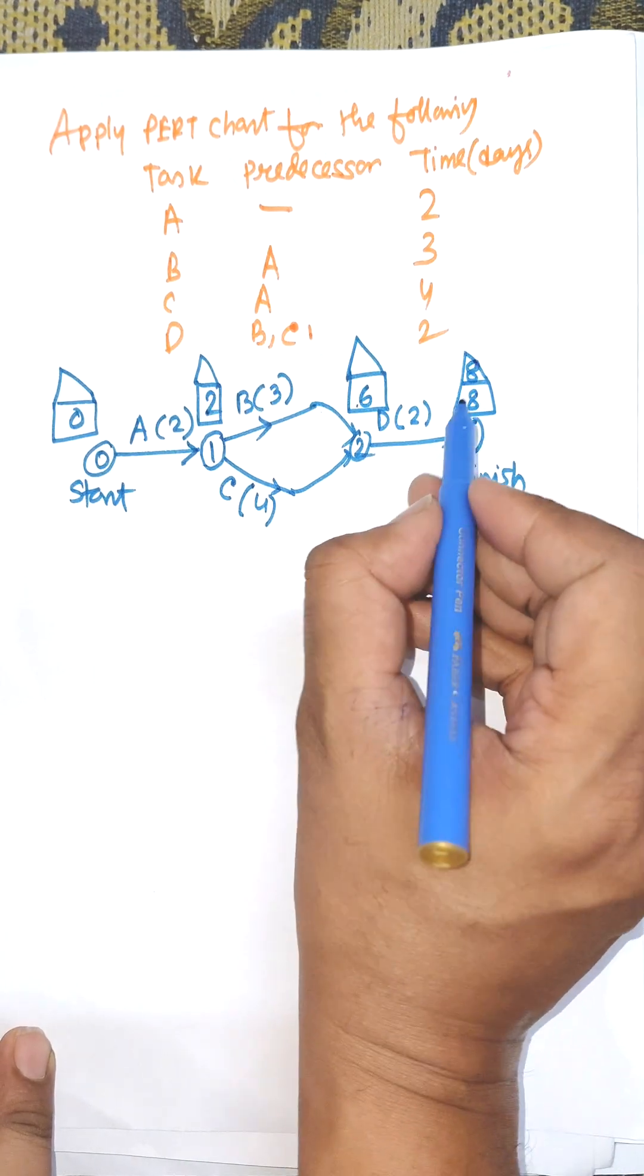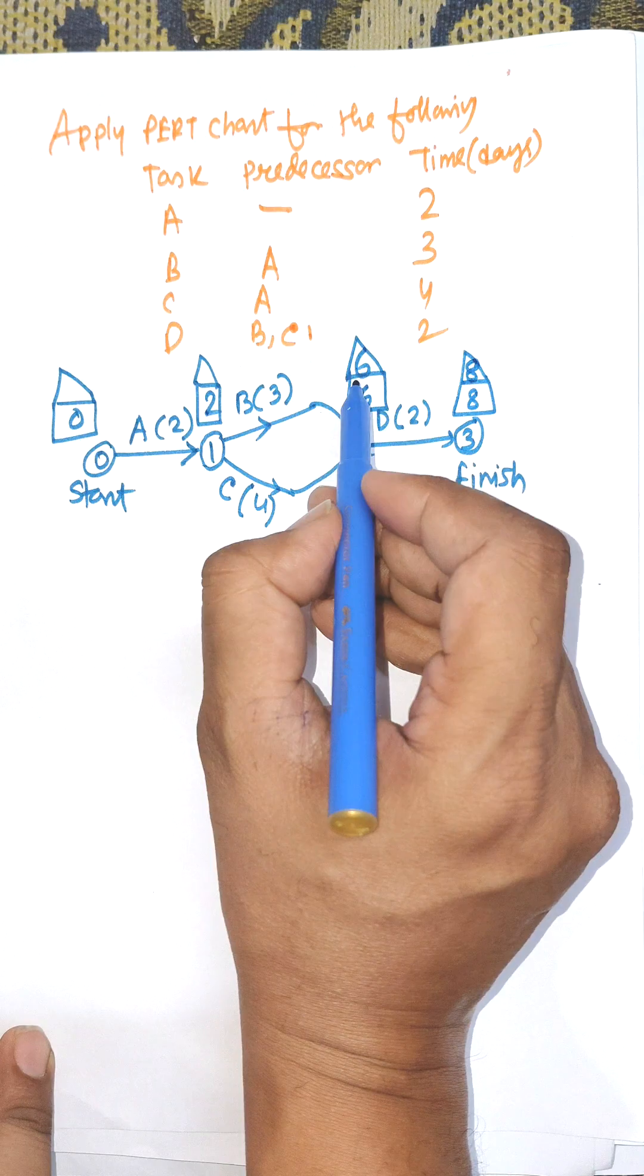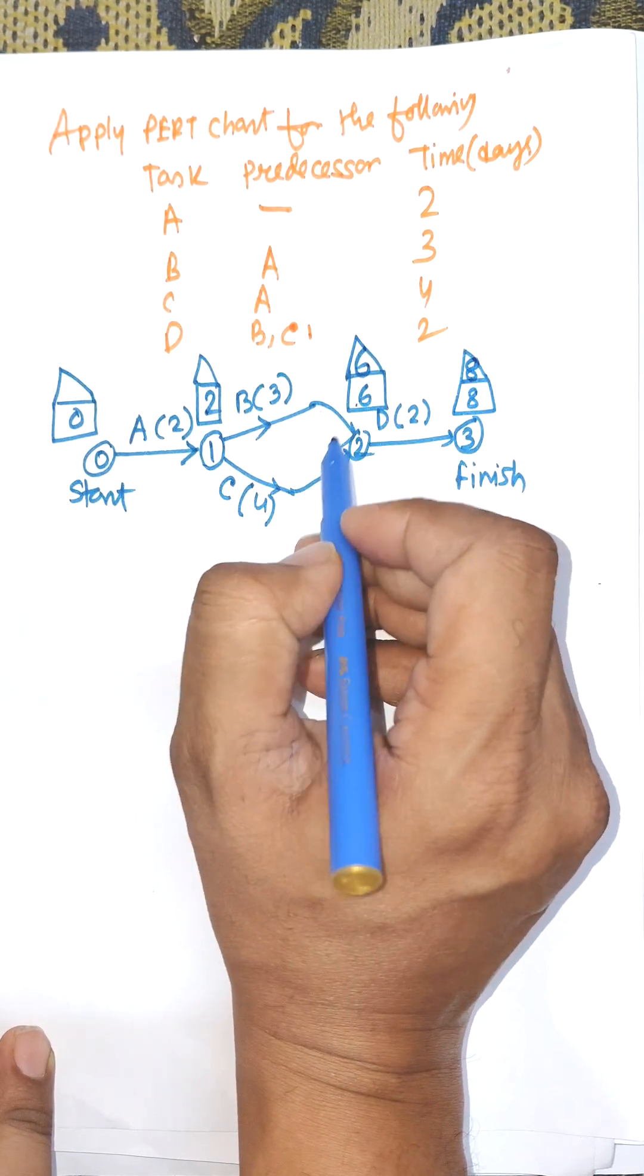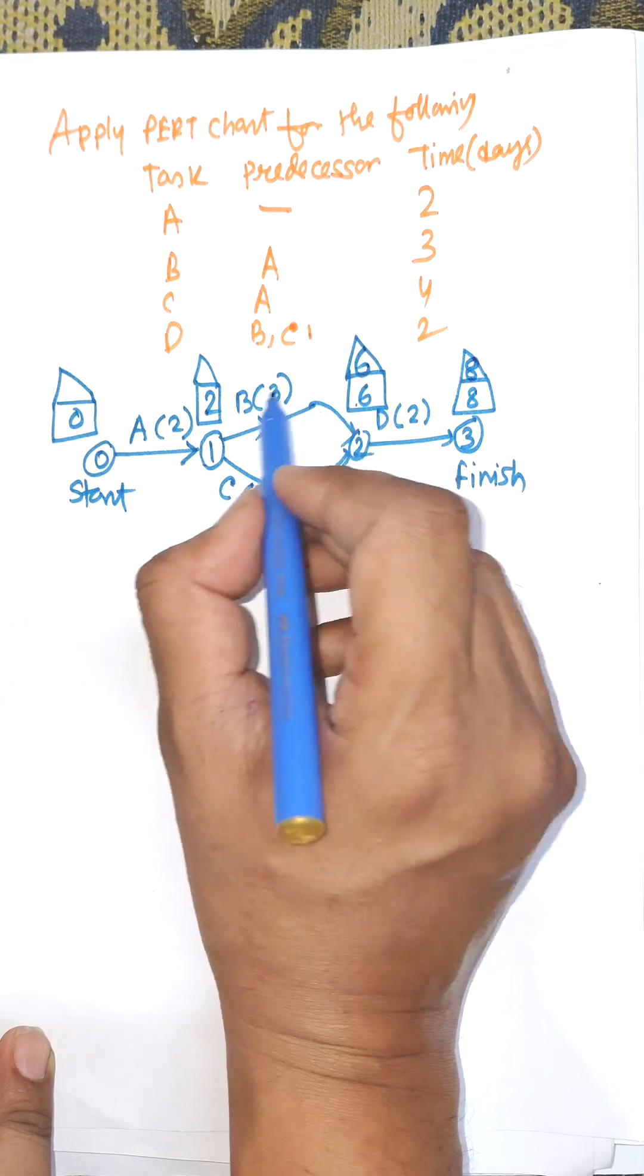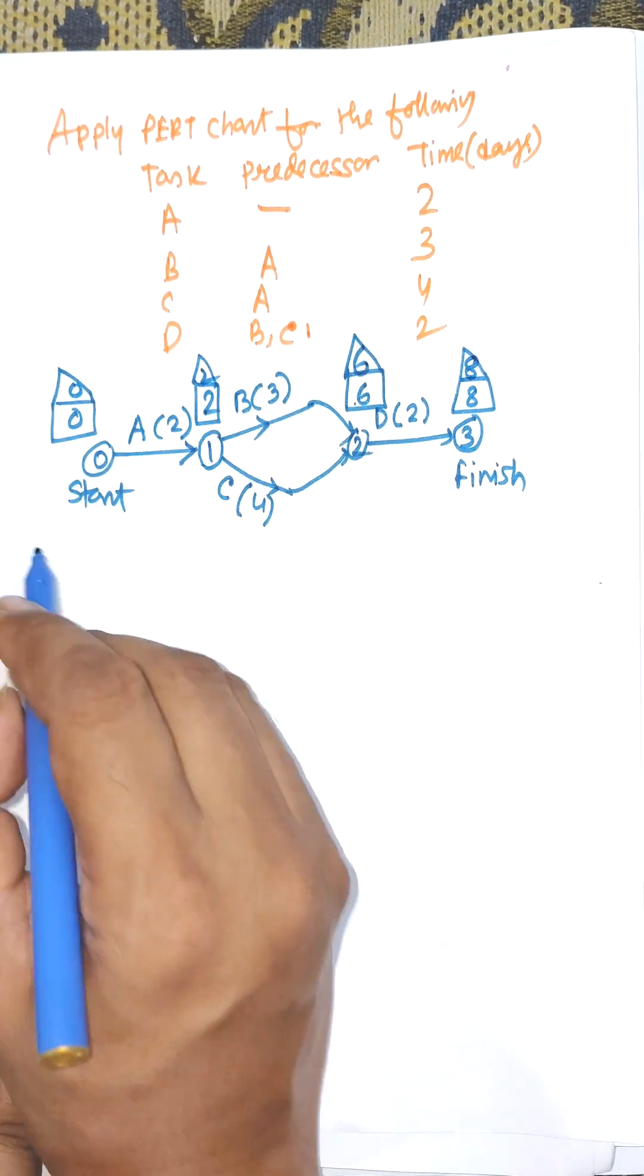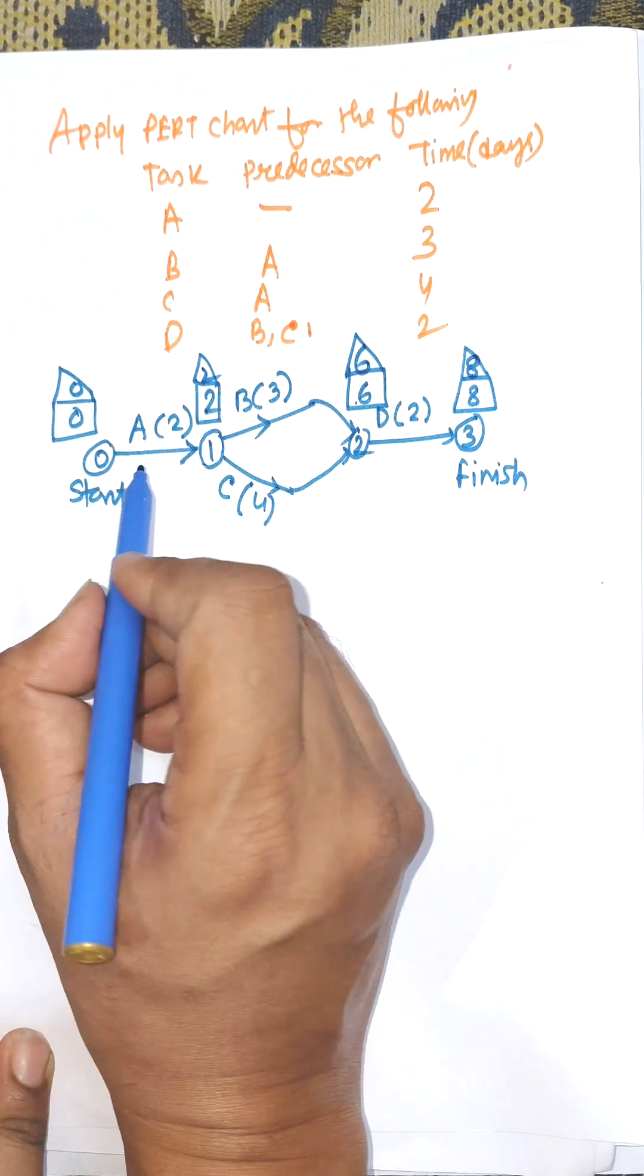It is considered as 8. 8 minus 2 is 6. 6 minus 3 is 3 and 6 minus 4 is 2. Now for backward calculation we need to consider minimum value. 6 minus 3 is 3 and 6 minus 4 is 2, minimum is 2. And 2 minus 2 is 0.